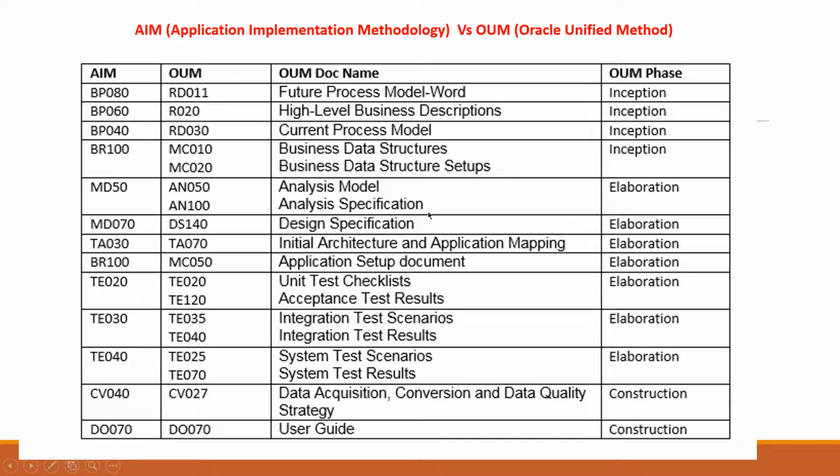So when the client is going to make a payment to the vendor, he says that once you are done with your BP, let's say RD 30, we will make 10% payment. During kickoff, 5% payment. Let's say we are done with MC 50, we will give you 20%. Like this, till this level, it will be 100%. That is in terms of project milestone.